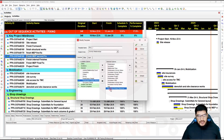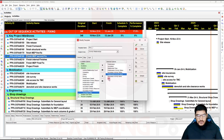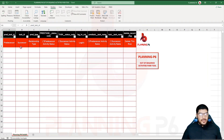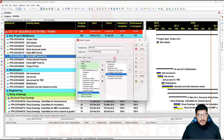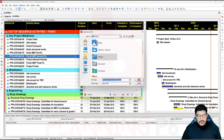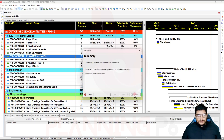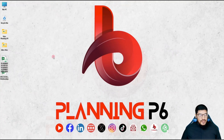We need specific columns: Predecessor, Successor, Relationship Type, Predecessor Activity Name, Predecessor Activity Status, Successor Activity Status, Lag, Predecessor Activity Name, and Successor Activity Name — we don't need Predecessor Project, Successor Project, or WBS. Save this template as 'Out of Sequence Activities,' select the Activity Relationship, click OK, then Next. Give it a location on the desktop, click Open, then Next and Finish.